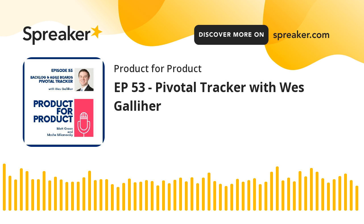Yeah. So one of the downfalls of using that, and one of the reasons I haven't used it quite as extensively, though I have in the past, is I believe it requires a consistent team, right? So the more that you swap out team members, or the team size reduces or increases, that predictability is going to vary drastically. And so I'm not so focused on that. And arguably when we're at a startup, we're building, things are changing rapidly, priorities sometimes change rapidly. And so those analytics are probably showing a worse story than what is actually happening. Right. So I don't want to put that on the developers, so they basically put a negative light on their ability to deliver work.